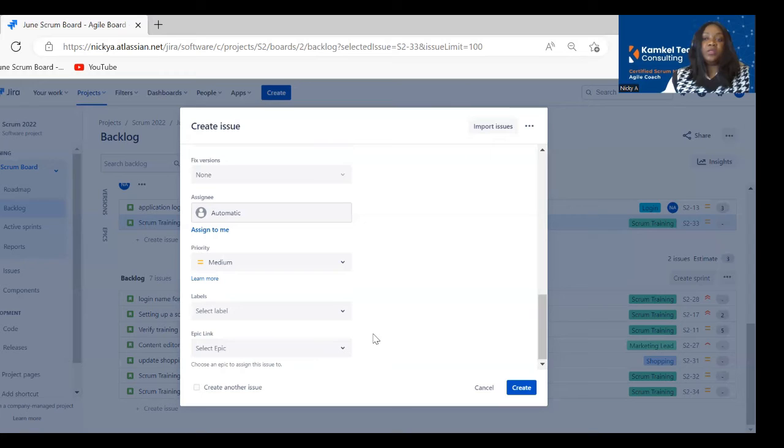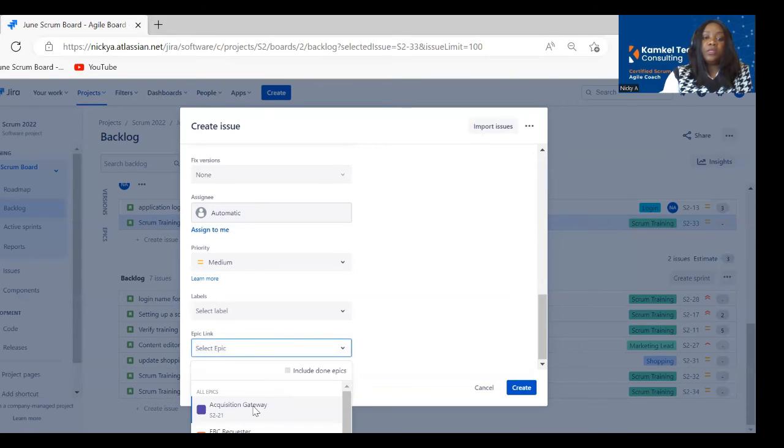And that's some of the responsibilities of Scrum Masters, right? To go on Jira and make sure that all your stories have an epic. So if you see that there's a story there that doesn't have an epic, just make sure that you find out what epic that story should be part of. So just ask them. Once they tell you, if you click on the drop down here, you will see all the different epics that are on your board. You just click the epic that they tell you. And once you are done clicking that epic, if you go here and click create, it will create the story. Like I said, it automatically puts it in your backlog. Okay. You can go here and click create.